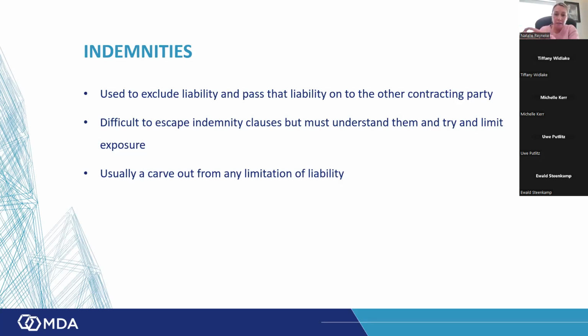If the indemnifier has no money, then the indemnified ends up taking the loss. So there's no certainty. And there's no certainty when we do business that the person we've said we're going to have a claim against actually has the funds to pay it. That's the risk that you take. So when I'm saying the contractor has indemnified me against all of these things when I'm getting claimed on, we can't control his balance sheet. We need to be aware of that when we feel in our comfort zone. We feel comfortable because we have someone else indemnifying us, and that comfort could be false.